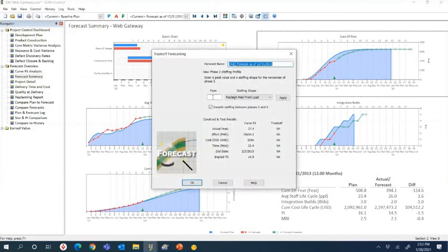We're late. A lot of times what happens is the decision makers, or the vendor, will say, hey, don't worry, we'll add people, and we'll get it done for you. And as a lot of people know, based on experience, that doesn't always work out. A lot of times we get diminishing returns when we add a lot of people. But we want to look at the trade-offs. We want to see what's reasonable. That way, the stakeholders are involved as well, transparency, and we can make good decisions and base it on the data. So here, we've got 27 people.